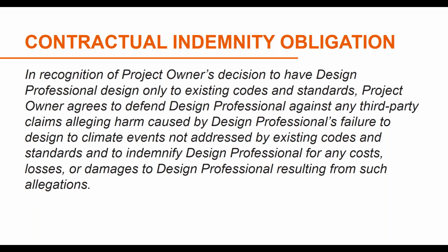And this is the only contractual indemnity obligation we will look at. An hour could be spent on reciprocal indemnity obligations or indemnification of the design team for specific perils. But let's look at this in terms of the difficulty of designing in a changing climate. Remember that such obligations are only as good as the assets behind them. So if your client is a government agency, it probably is prohibited from defending and indemnifying a private entity because doing so would surrender sovereign immunity that the government client has.